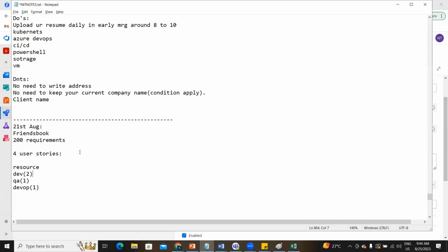Okay, 4 to 5 hours, 4 to 6 hours. Because for the remaining you'll say 8 hours. If you work 8 hours, then who will do the stand-up call? Stand-up call is half an hour. Lunch, tea breaks, chit-chat, discussion. Who will do that? So on that basis, people would be working hardly 4 to 6 hours.